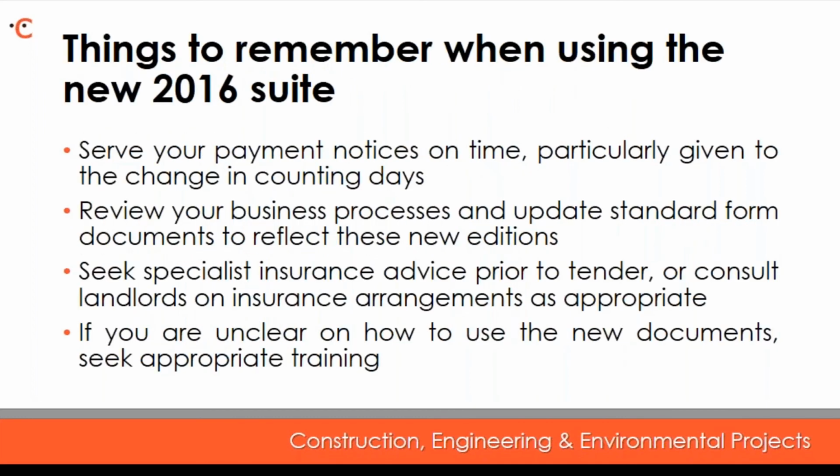That covers all the substantive changes that we've come across. So just a summary now of a few key points to remember when you're using the new 2016 suite. First of all, serve your payment notices on time. I'm sure that won't be a shock to any of you, but when we do give reference to the change in counting days that Victoria previously mentioned, it is of increased importance. Now's the time to review your business processes and update your standard form documents to reflect the changes that we've just discussed.